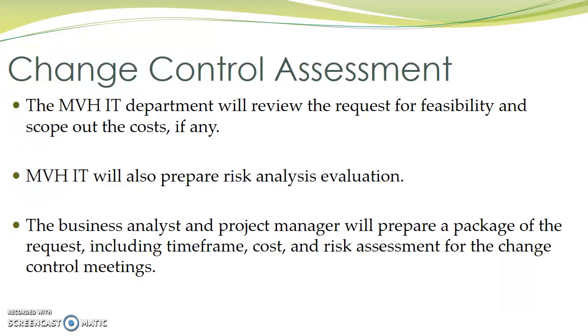Change control assessment. Meadowview Hospital IT department will review the request for feasibility and scope out the costs, if any. Meadowview Hospital IT will also prepare a risk analysis evaluation. The business analyst and project manager will prepare a package of the request, including time frame, cost, and risk assessment for the change control meetings.